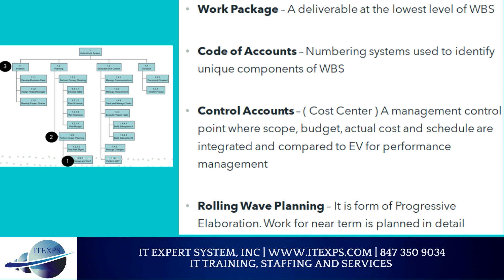The essential activity of every project manager is to ensure that the work breakdown structure and all of the various artifacts are well created by the team and well organized and well managed. Things like the work package — the work package being the deliverable at the lowest level of your work breakdown structure — having a code of accounts as needed, control accounts, and so forth. All of these aspects need to go into your work breakdown structure, which becomes the entirety of your scope.